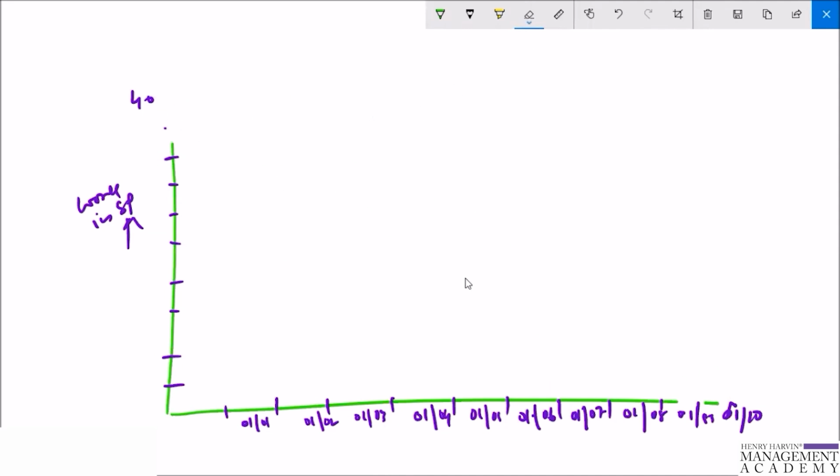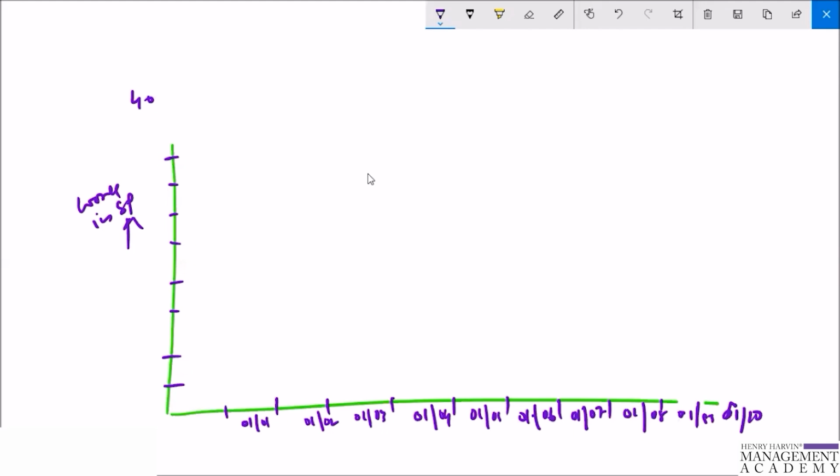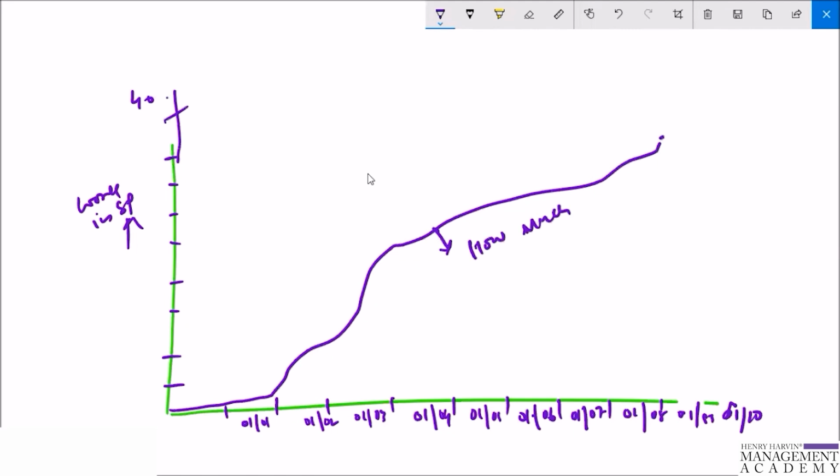Okay, so now what we are going to draw from this chart is how much work is completed. This line will show how much work has been completed. Like the burn down chart shows how much work is remaining, the burn up chart tells how much work has been done. So at a particular interval of time, the amount of work done can be identified.